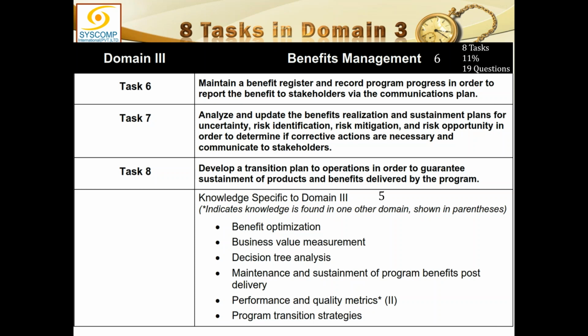Now, out of these several things, there are certain final items. Let me take the example of project schedule management. The schedule management plan tells me how to identify activities, how to sequence them, how to calculate their estimates, and how to develop a schedule.